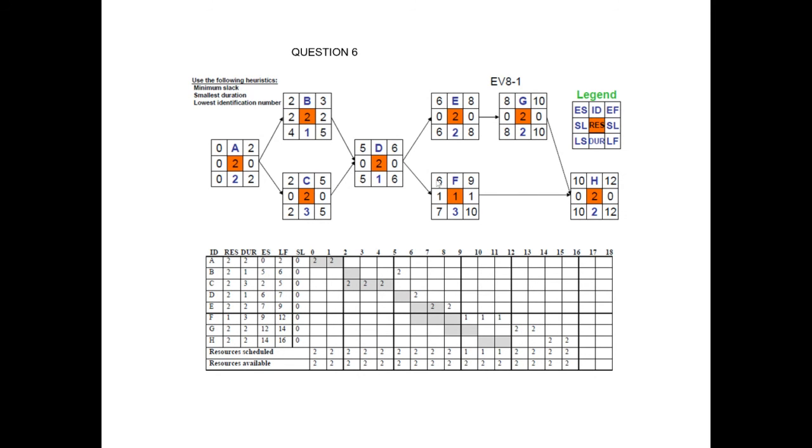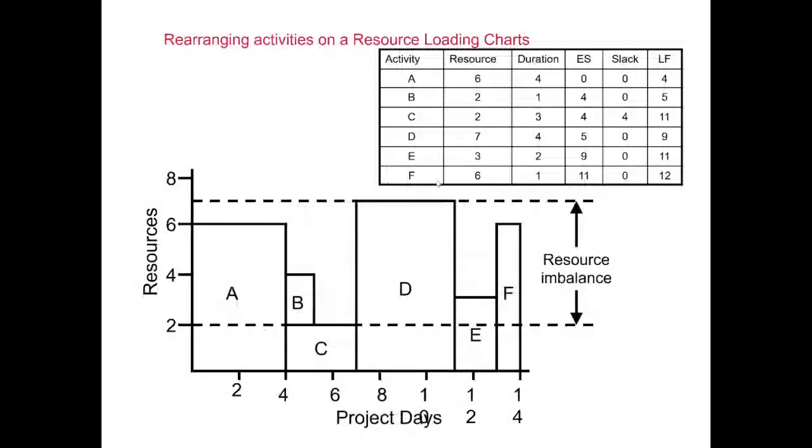The point I was making was, in comparison between F and G, F should be given preference, because you have to take into account the new early start time, and that was 9. So 7 take away 9 gives you -2 slack, which is why we give preference to F. And once we have done F, then we move on to G.